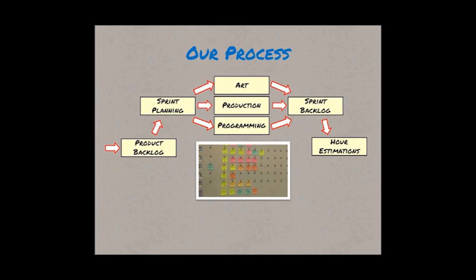Here's a snapshot of our Scrum wall. And after we got our estimations done, we started into the sprint. We kept Hansoft updated daily. I was kind of champion of that, to make sure stuff was marked in progress or completed when it was done. We did our daily stand-ups every day, in which case we would all meet in front of the wall you see here, talk about what was being done, what was in progress, what was completed, and then the post-its would move along that wall as needed.